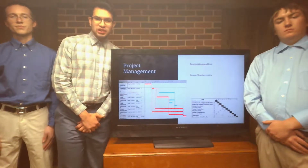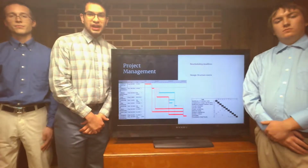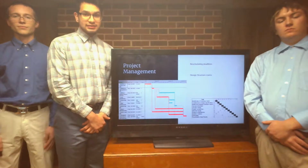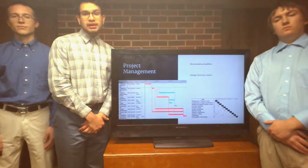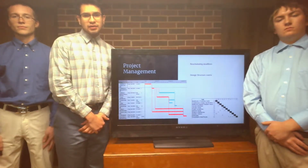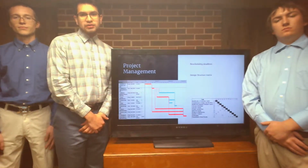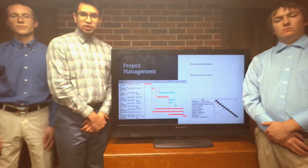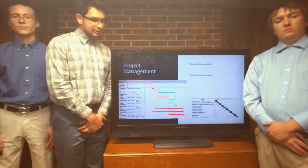The team regrouped and changed the deadlines in order to better meet the manager's specifications. The identification of customer needs and target specifications were the same because we already completed these tasks. The team decided to extend the timeline of design for manufacturing, economic analysis, and the prototyping in order to better ensure a design for our Rube Goldberg machine. After reviewing the Gantt chart, the team wanted to better organize the relationships between tasks. So a design structure matrix was created in order to establish the sequential and parallel tasks.